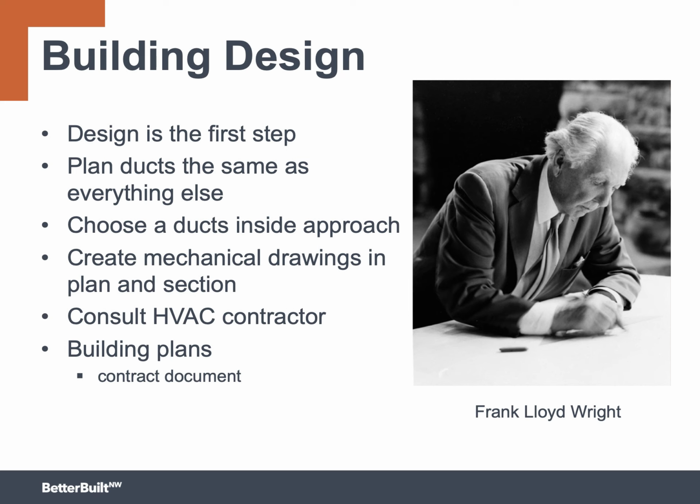If you leave the plans vague, it's not going to help in figuring out who's responsible for what parts of the project. The plans are also an essential communication tool because you use the plans to get bids and all the trades will know exactly what their scope of work is. If the HVAC contractor wants to know what his job is, he can refer to the plans.